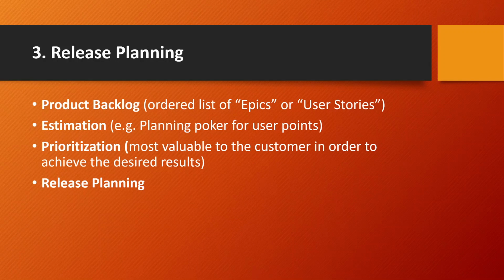And this one, in a one sentence summary, is to deliver a range of features in a given time frame. So we derive this list from the features, the size of the project, and how quickly our team can develop quality software that meets customers' expectations, and techniques for managing the risk of uncertainty. So, long story short, in the release planning, there are a couple of bullet points that I listed here, 4 of them to be exact, that we need to take care of in order to plan this release and really see the path to building this software project.